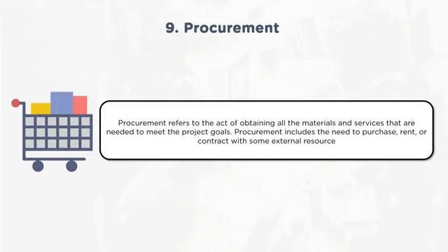Another type of contracting can be time and material, where the billing will happen based on the amount of time one spends on that particular hire, a resource or onboard a resource on a time and material basis, and what is the effort that resource has put in. Based on that, billing will happen. So three types of contracts, depending on the different scenarios of the project, will be signed with the contractor.